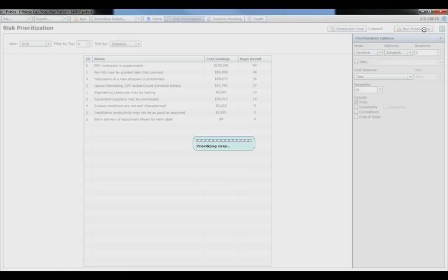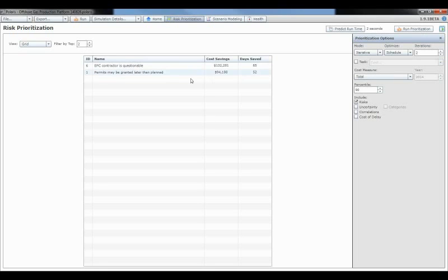So this is actually going into, like I said, more of an optimization routine. Now, this gives you the same output as the single pass, as the 2 risks you should do. But what this is telling you even further is that you should remove risk number 6 first, and then you should remove risk number 1. And this is actually starting to take schedule construction into account. So if we fully remove this and we ran it, we've actually seen areas where this has been completely different. And they say, well, risk number 1 is no longer the top contributor after you mitigate risk number 6. It could be risk number 2 and 3. You can run multiple iterations for as many risks as you want to do. This is just running the model hundreds of thousands of times at this point, the more iterations you do.